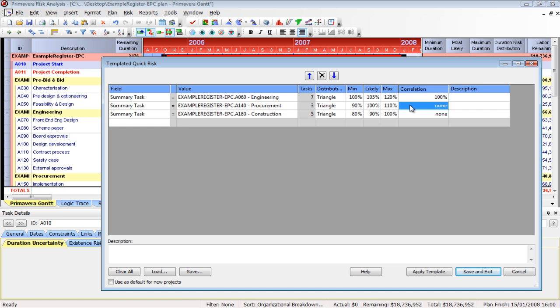It's easy to break down why a 75% and an 85%, either one is equally justifiable. So I think people get really in the weeds and start saying, oh, it has to be calculated a certain way. You know, 100% correlation is going to completely hit the same point of the triangle. 0% correlation is complete randomness. When you're 80 to 100% though, you're still very heavily correlated. If you're 60 to 80, a little less so. Once you start getting down below that, it's a weaker and weaker correlation. Down below 40%, you're getting very little effect.